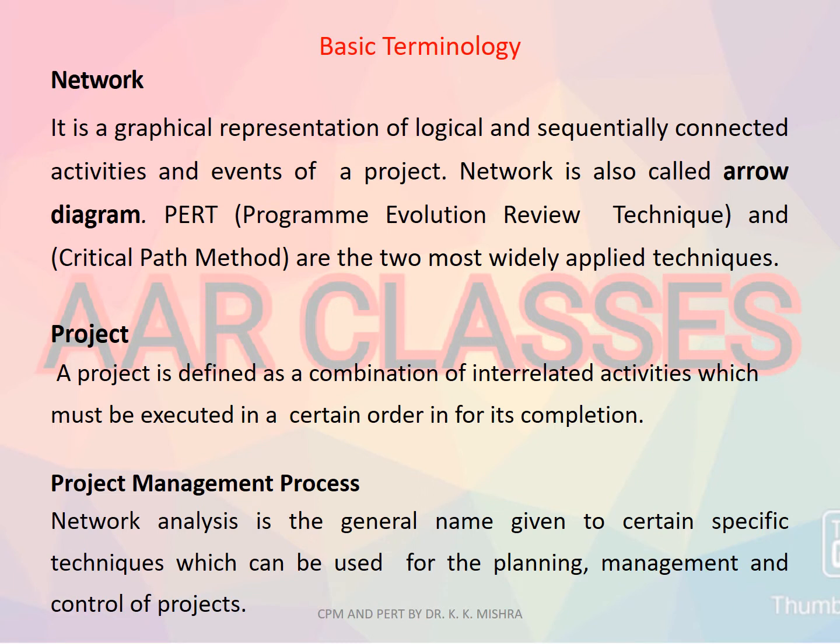Therefore, the initial step in CPM and PERT project scheduling process is the determination of all specific activities that comprise the project and their interdependence relationship. A kind of precedence or successor succeeding events exist in a network.